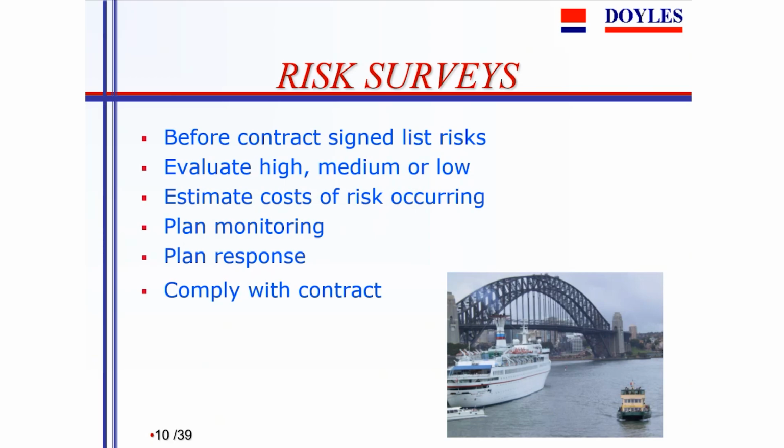And then you've got to monitor the risk, because there's no point putting your head in the sand and saying, well, hard rock will be difficult, if one doesn't then check in every Friday with the person excavating the rock to see whether it's hard or soft. And it's important to plan a response. If it is hard rock, what are you going to do about it? There's a limit to what can be done if you've got a machine on site and the rock goes hard.